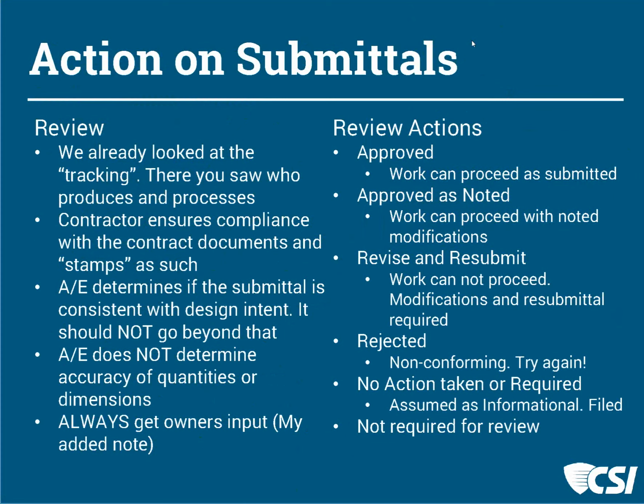If they involve a product or color selection, I'll send them to them as I review them. I then follow that up with a submittal to them once the review is complete and I've sent it back to the constructor. I think it's important, particularly when owners have facilities and maintenance personnel. I have received extremely valuable input from the owner's team when I involve them in the review or in the action that is taken on submittals.